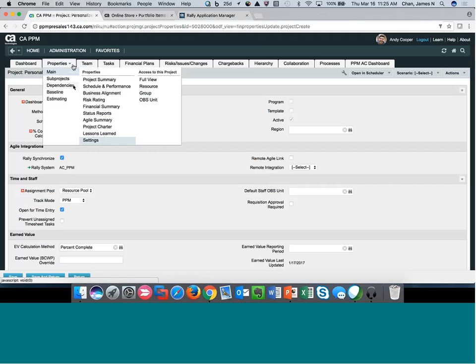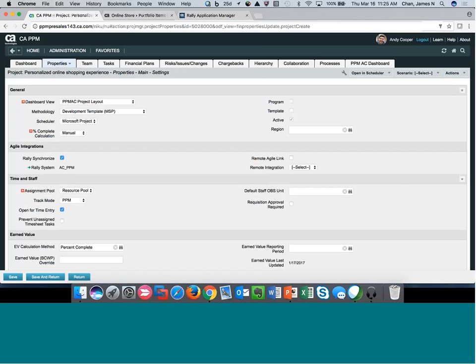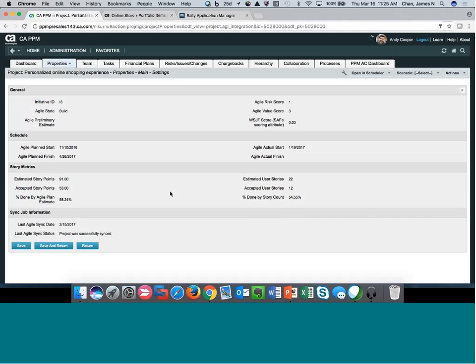From a status perspective, you can see the percent done by plan estimate, percent done by story count, number of points, and accepted stories. Even though we're bringing everything over at the feature level, we take all the different stories inside Agile Central, roll them up and aggregate them back at the feature level so you have visibility from that perspective. You can also see everything at an aggregate level — these fields, because they are now part of PPM, can be put on reports and portlets.